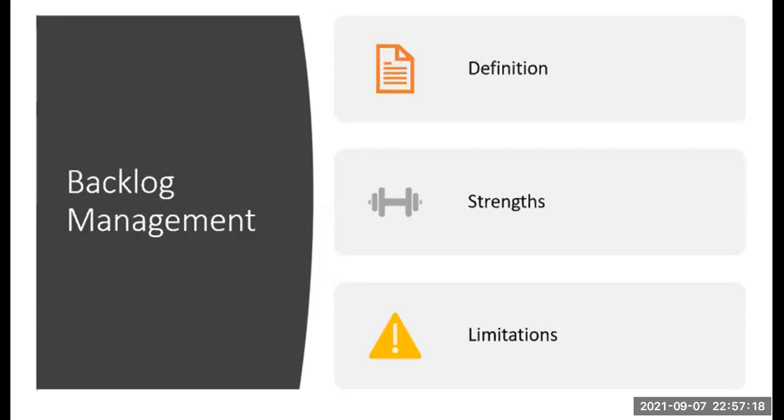The other disadvantage of having stale features in your backlog is this: let's say you created a feature, added the required details, estimated it, added the business value, and maybe you picked it up after 6 months. The details that you added 6 months back may not be relevant anymore, correct? The details are lost over time and the information may be outdated. That's another reason why we need to always keep the backlog up to date.